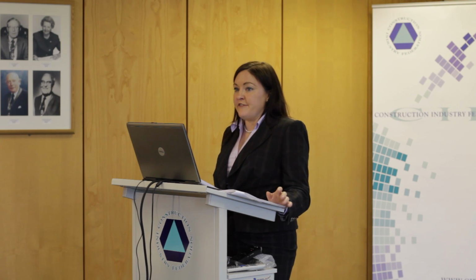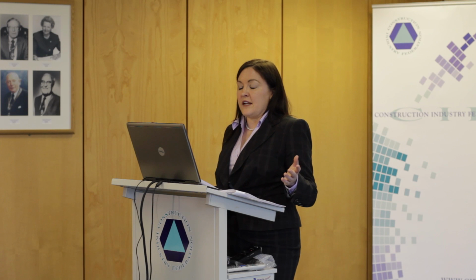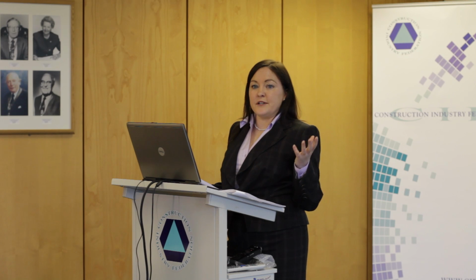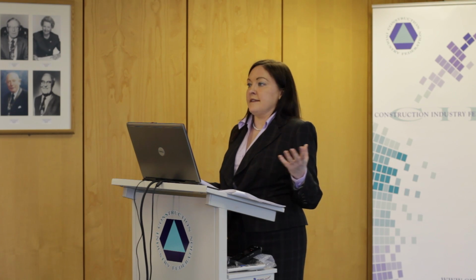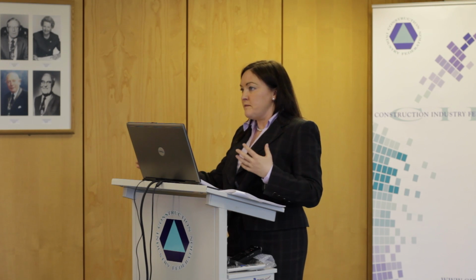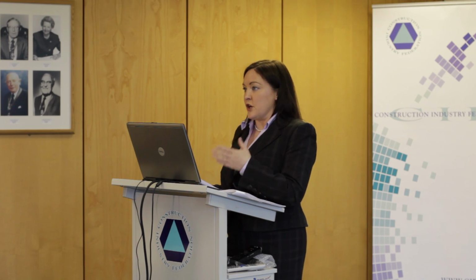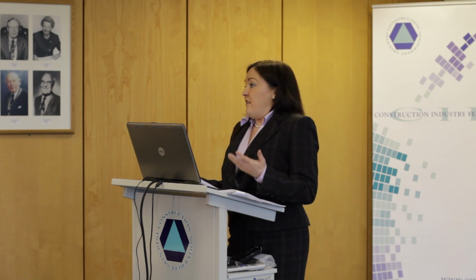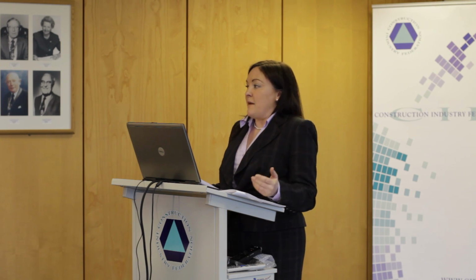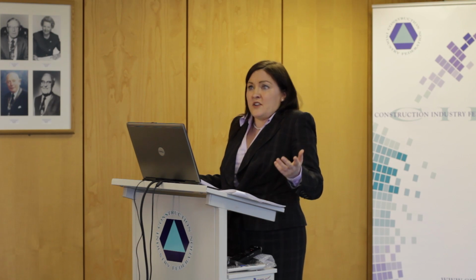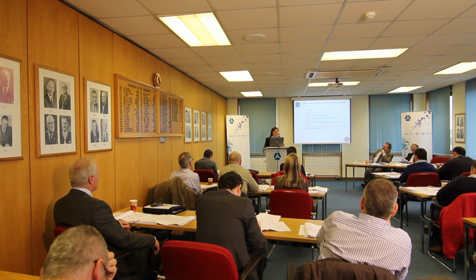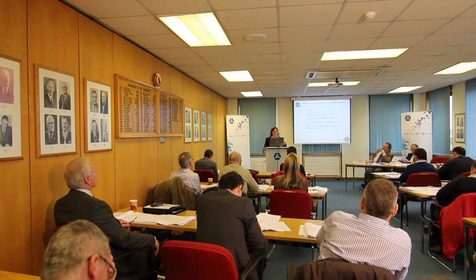What is reasonable time? Not defined under the contract. You decide. I'm sorry, my practical examples are useless because I'm a solicitor, not an engineer, but if, for example, your rebar guy was supposed to be there yesterday and hasn't been there and hasn't laid the steel and you've got concrete arriving tomorrow that you're going to pour, it's urgent. You need the instruction straight away. So you need to say, I need an instruction today. If it's something that's like 10 days off and you could just see it coming down the line, fine, say it then. But the EOR will be able to say, well, you didn't tell me I needed it urgently. You go, well, I had a concrete truck standing there, was it not obvious? No, if it's not on paper, it's up to you to make sure it's on paper so that the EOR knew that you needed it today.